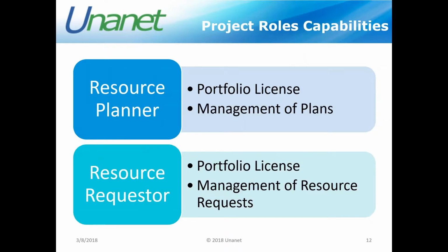Now, a couple other project role capabilities we want to talk about here are in regards to resource planning and resource requester. Now, if you think back to one of my earlier slides where I talk about the different roles based upon your license type, these license types are only for the portfolio license. The resource planner is a role that allows them to create and manage plans. So they can say, okay, what if I wanted to look at this scenario and I put these people on it? What would that look like if I were going to plan that out?